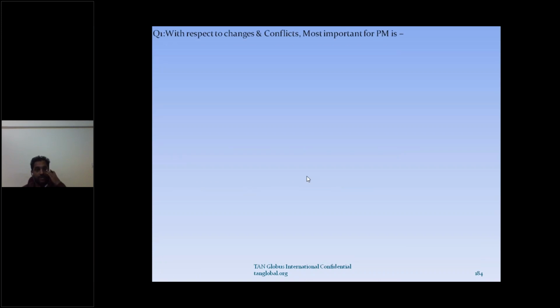Let's take some of the questions now. With respect to changes and conflicts, the most important thing for a project manager is to remember that changes are not bad. If the customer is adding one more floor to your building, and he is paying you well as per your expectation, would you not like to take the change? Obviously yes. The problem would be if the customer is adding one floor or 100 more features and not paying you, or not taking into consideration other factors like change of schedule. If it is agreed, controlled changes and controlled conflicts are actually good for the project.